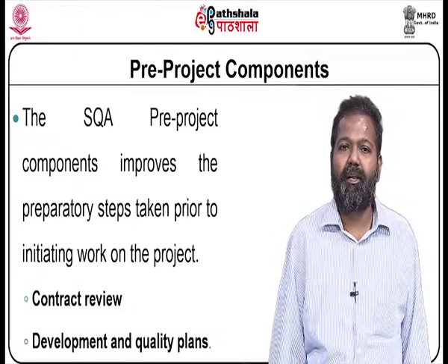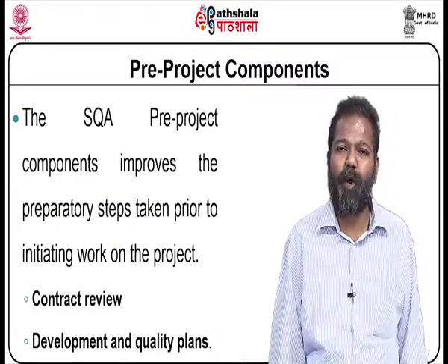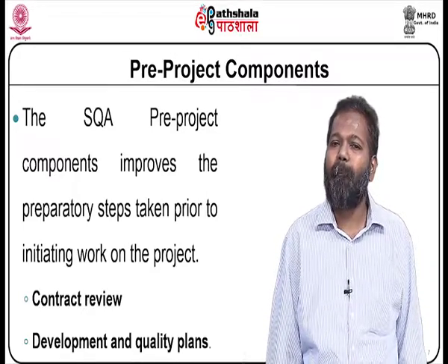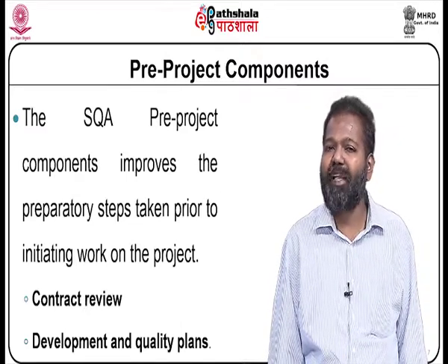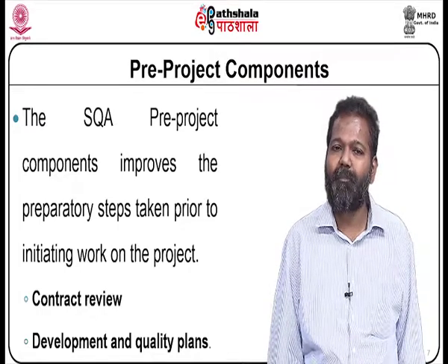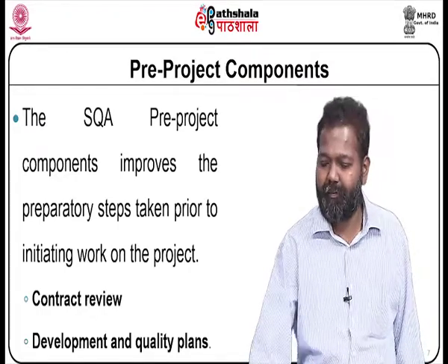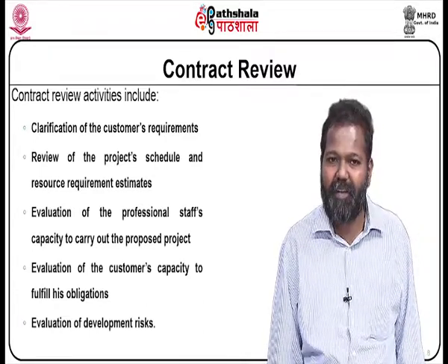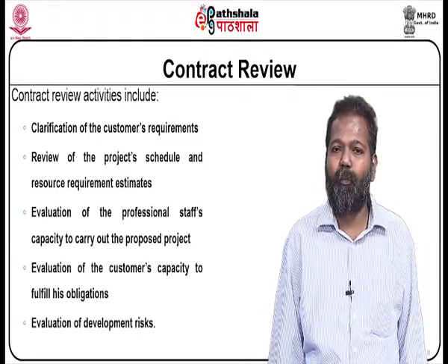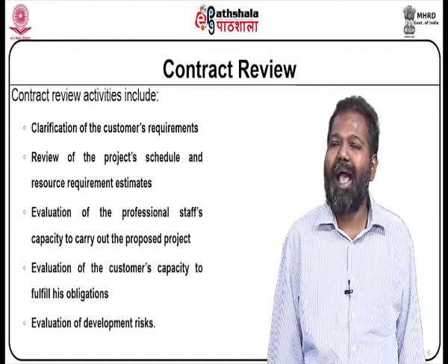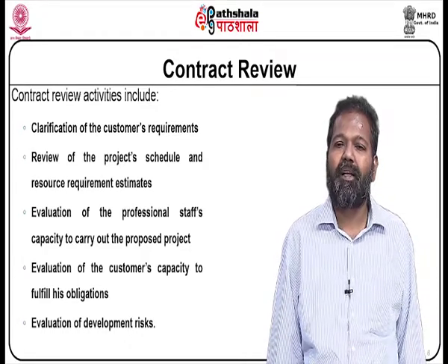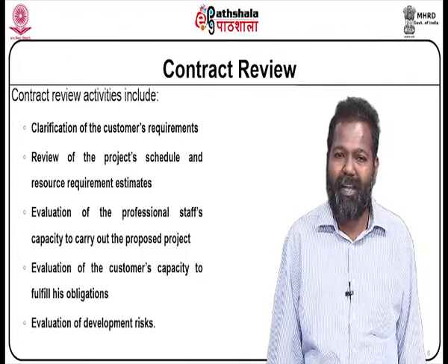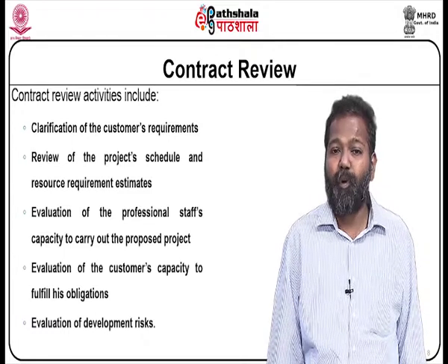Pre-project components. The software quality assurance pre-project components improve the preparatory steps taken prior to initiating work on the project: contract review, development and quality plans. Contract review activities include clarification of the customer's requirements, review of the project's schedule and resource requirement estimates, evaluation of the professional staff's capacity to carry out the proposed project.